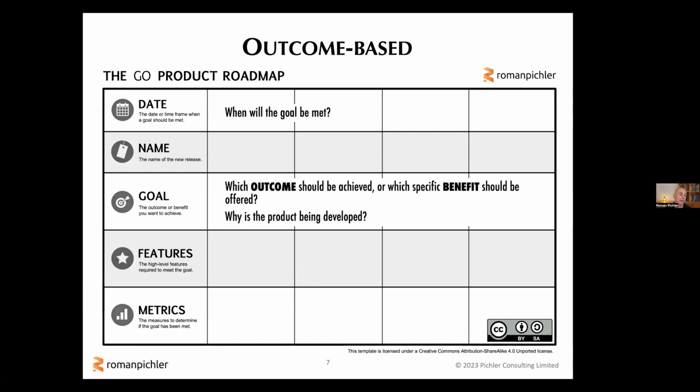Why? Well, ideally, you'd like to fully meet all goals on time and on budget. But in reality, as you probably know from your own experience, that's not always possible. In software development, things can go wrong. And then it's important to be able to understand what is more important, fully meeting a goal or adhering to a date, assuming that you can't just increase your budget. And even if you can increase your budget, you may not be able to find enough people with the right skills quickly enough so that they can become productive and really make a positive impact.